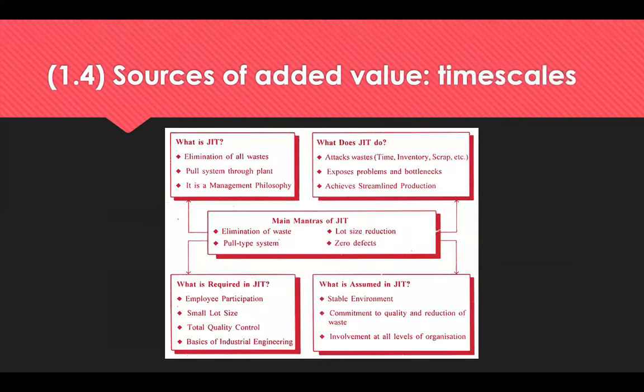Now, time is a finite resource that must be managed closely. Areas that can be addressed and analysed include discussions with suppliers prior to contract agreement, to establish the actual timings, the reduction of time where feasible and practical, securing on-time delivery and making product development more effective. So accurately negotiate, interpret and verify the supplier's lead times. Try and shorten supplier lead times where possible, reducing our own procurement cycle times. Work with the supplier to ensure on-time delivery and reduce new product development idea to market cycle times.